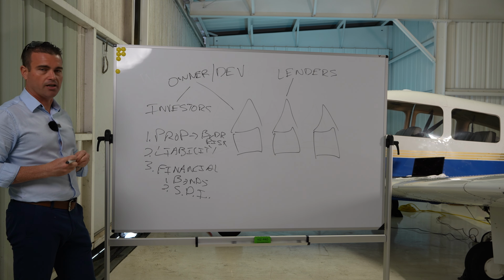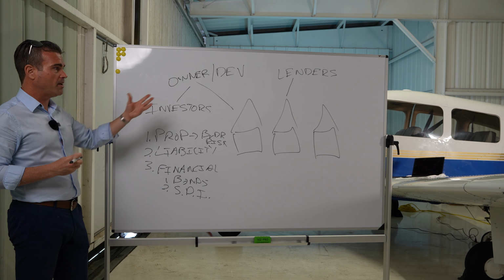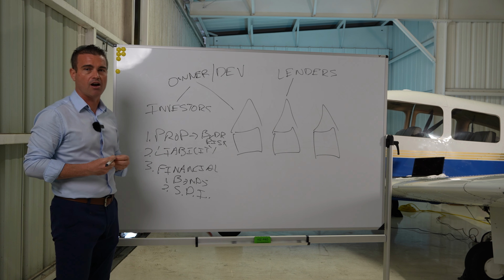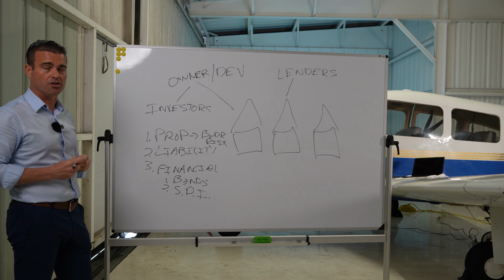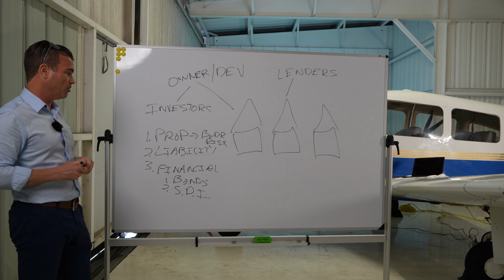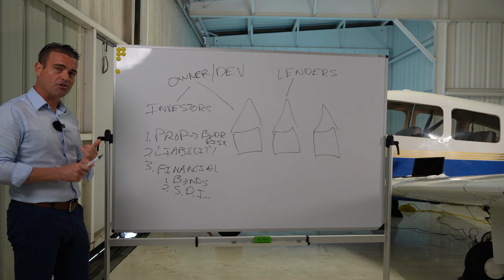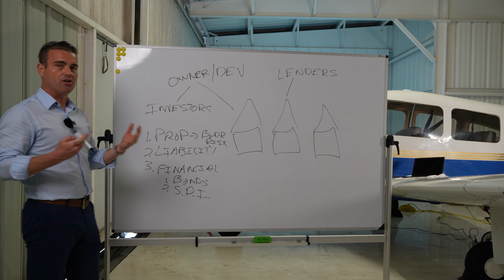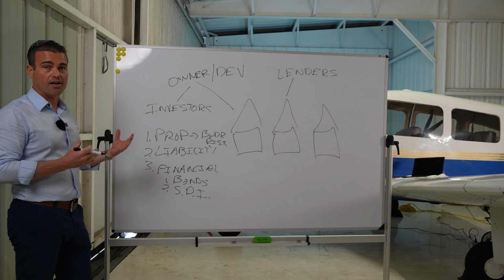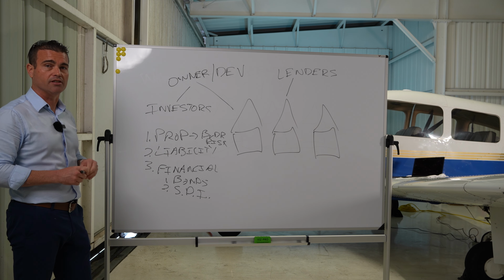of our projects, we're looking at doing an OCIP, or depending on who the GC is, if it's a large GC, they'll have a rolling CCIP, a contractor-controlled master insurance program. So the important part on that is we always want to make sure that the contracts mirror the coverage, because you could have coverage that needs a contract trigger, right? The coverage is going to require certain things in the contract.